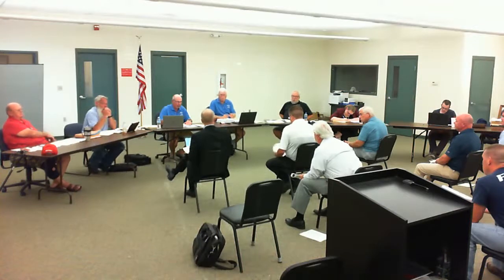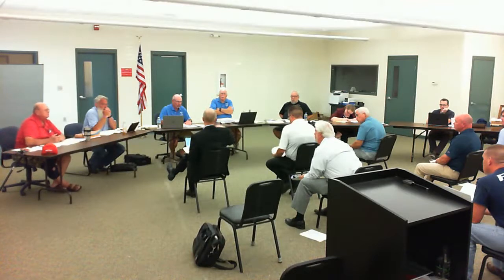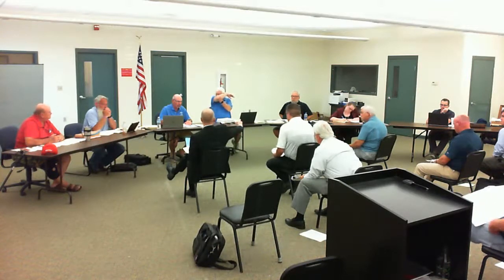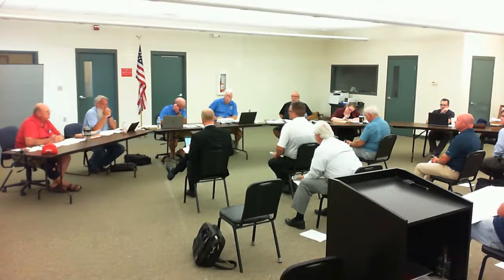It will accumulate, right? If you don't spend it each year, it will accumulate in a capital fund that you have. So if you know you are going to have to do something like that two years out or three years out, the prudent thing to do would be, for those years prior, make sure you're not spending all of what comes in, so that you build up enough cash for that third year and can pay for it with cash. So cash management of that is going to be king.